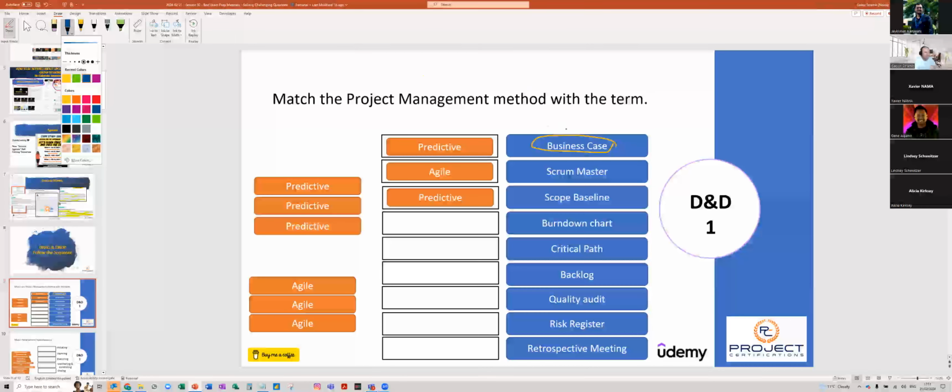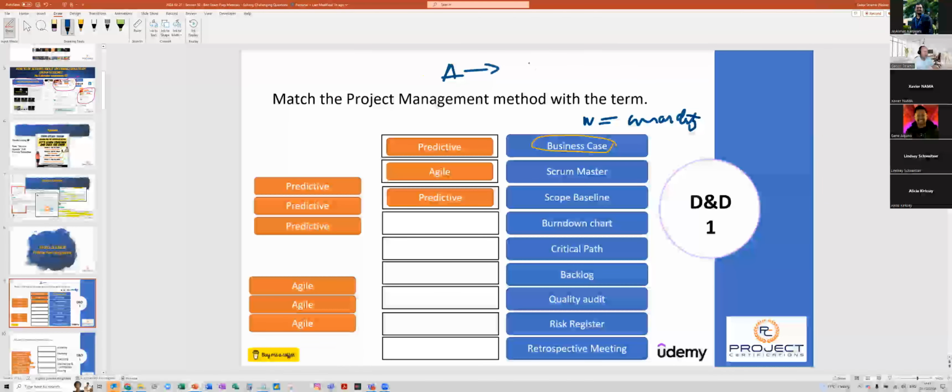Now, I would say that a business case as a document does not really exist for agile, because what we need to understand is that there is no project without business case. So on waterfall, this is mandatory, because on agile, what we have is the product roadmap. The product roadmap will highlight the key features which each release will deliver, giving the indication to the business to make sure that they understand what to expect looking forward, and therefore that also very much justifies the activities we do.